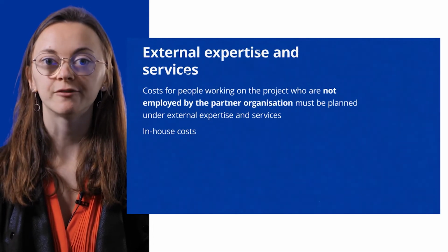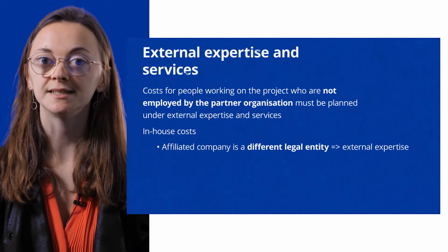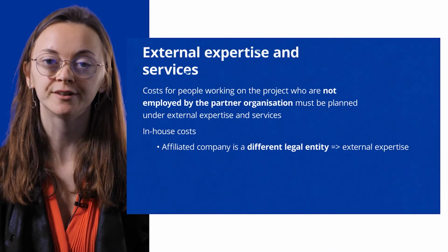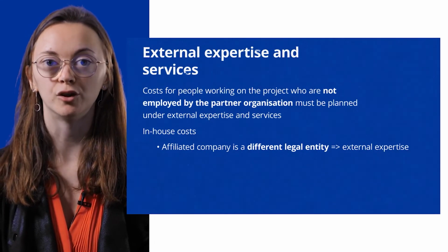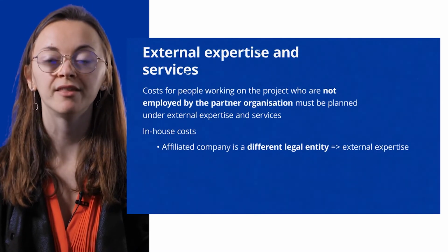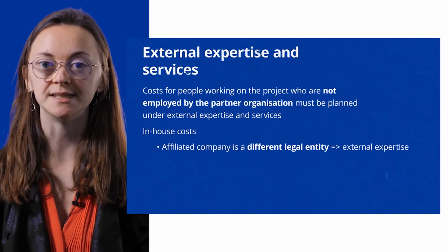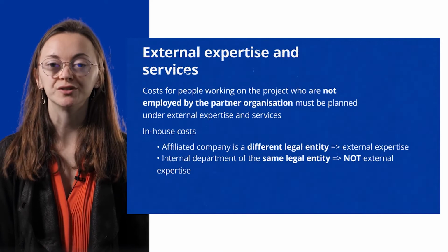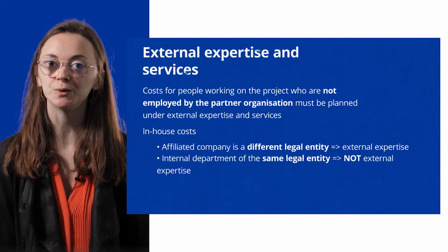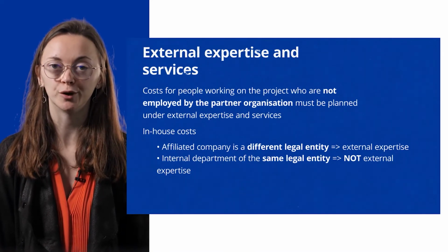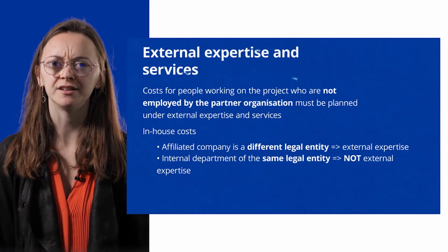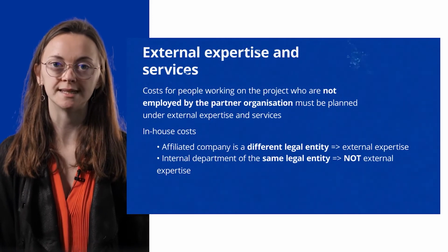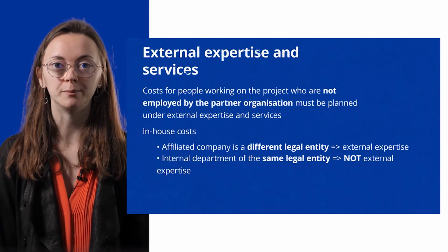If the staff are working from an affiliated company who is a completely different legal entity than the partner organization, then the cost should be planned under external expertise and services. However, if by in-house you refer to staff working in an internal department of the partner organization and there is no separation of legal entity, then the cost should be planned under staff costs.